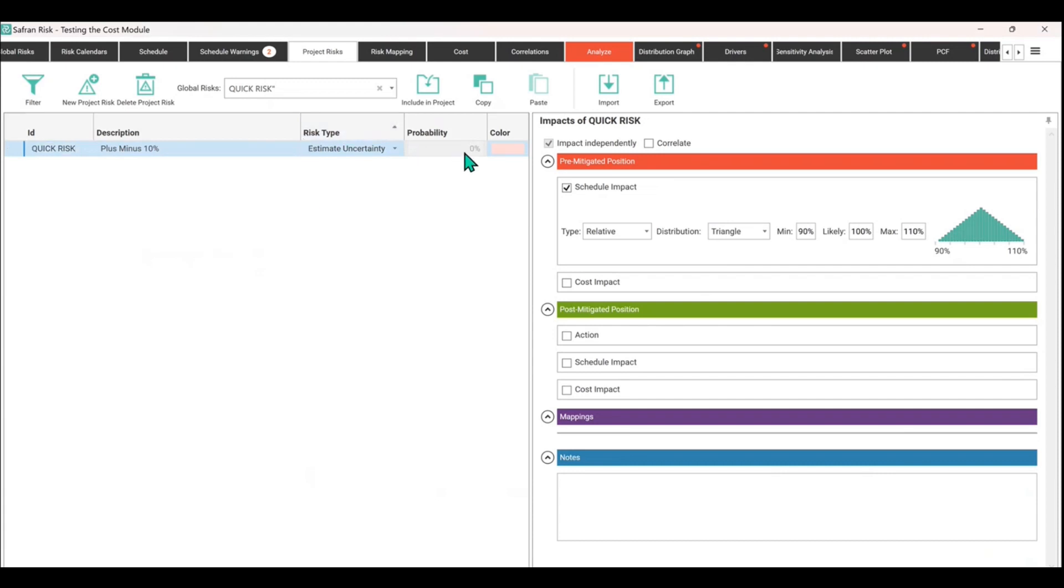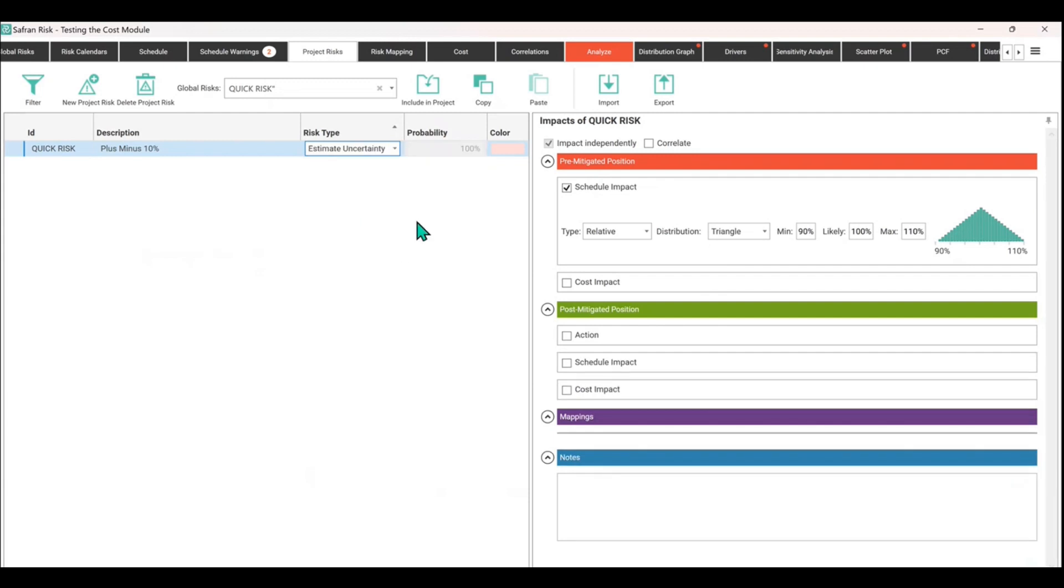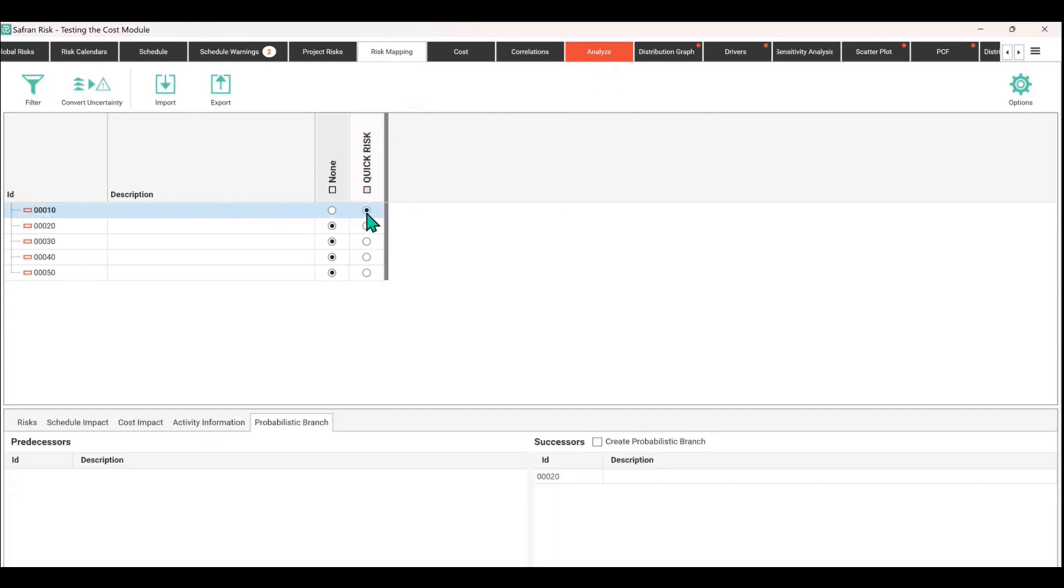Now the probability actually says zero, and that's not right. If you ever see an issue like that, just change from standard and you can put it back to 100, then put it back to estimating uncertainty if you need to. Estimating uncertainty should always show as 100.